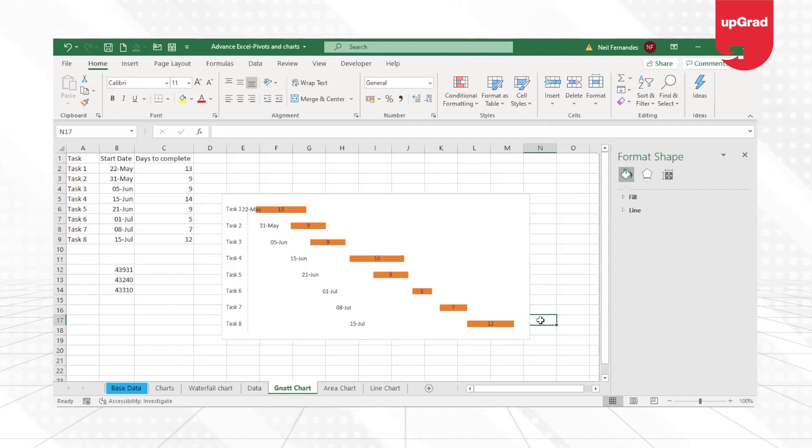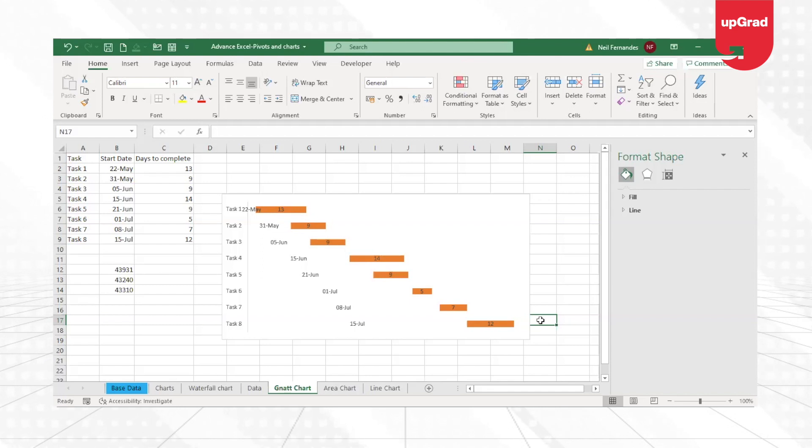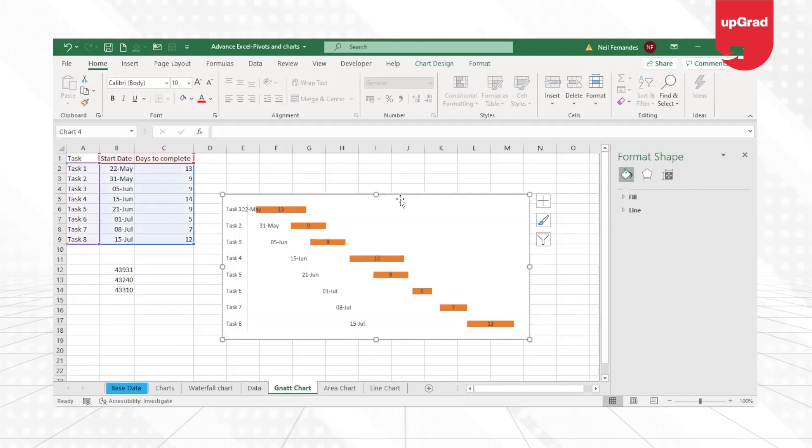So this is how you can create a Gantt chart inside Excel by using the stacked bar chart and making some format changes to your data so that it looks like a Gantt chart.